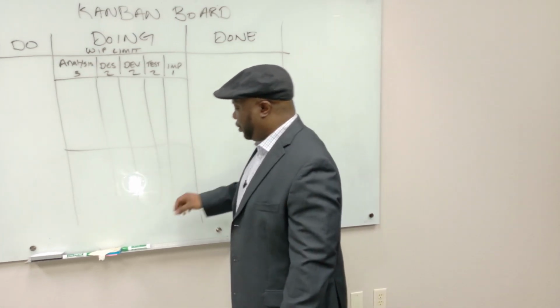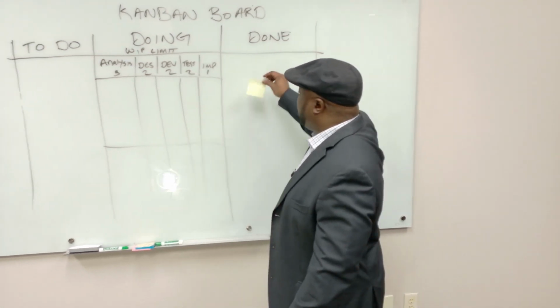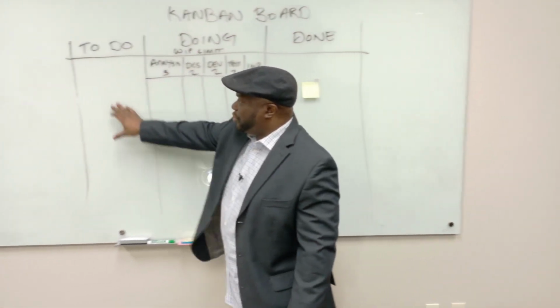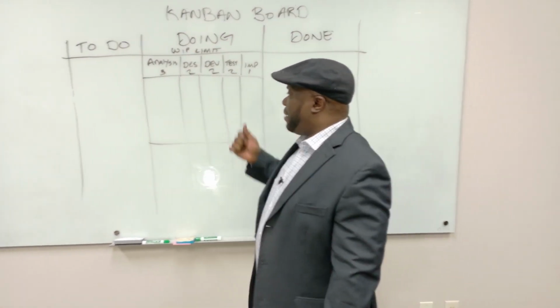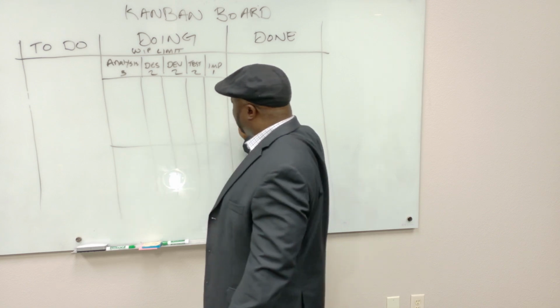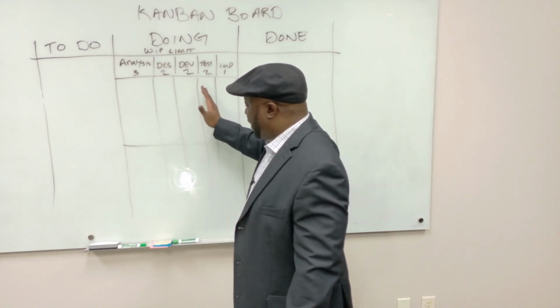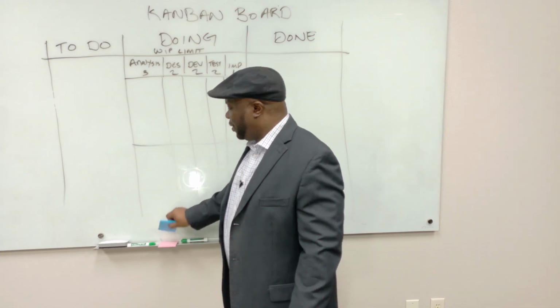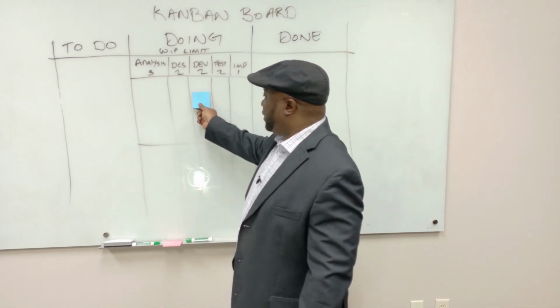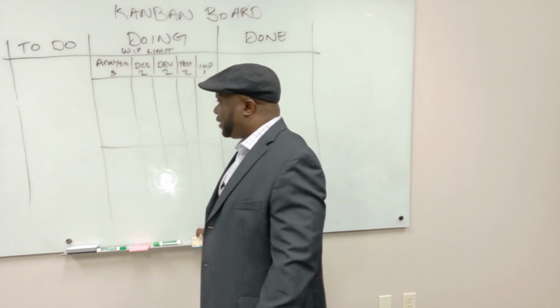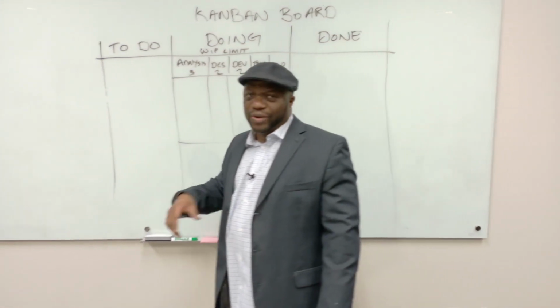And let's say you as a team player get your item done. Well, you're not going to go back to the to-do, which is more like the backlog, and begin pulling new stuff. You're going to look at what is closest to being done and who needs help with their item. So assuming you had a team member with an item that is here and you could help them, you work on helping them as opposed to going back to the to-do.